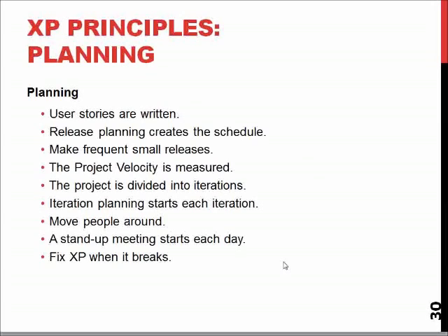Move people around so that people are available to see the system from many different angles, and start your day with a stand-up meeting so everyone knows what other people will be doing today and what will be happening for the rest of the day or rest of the week, or at least a couple hours forward.